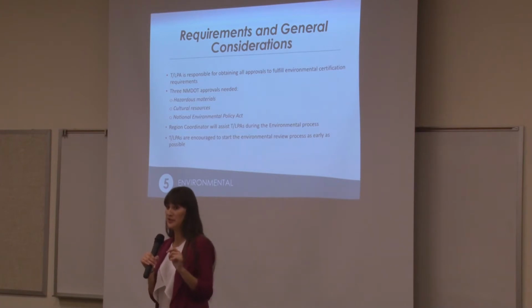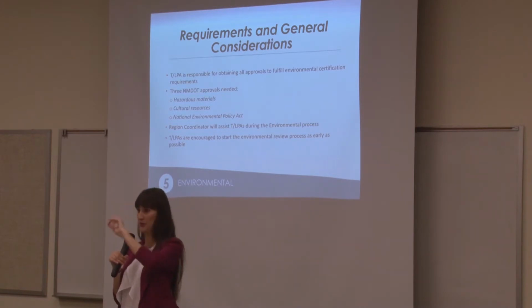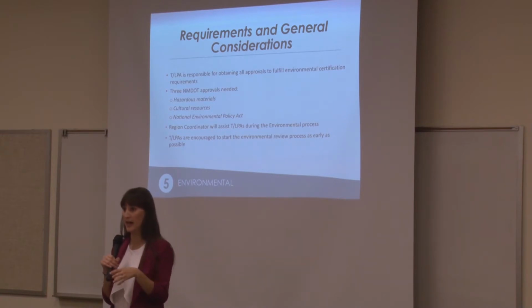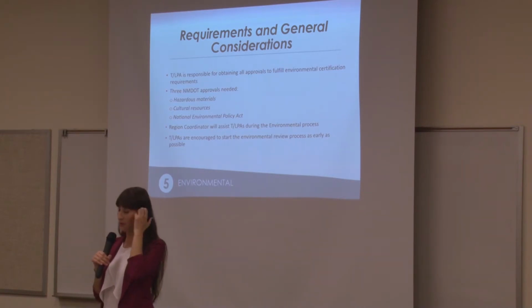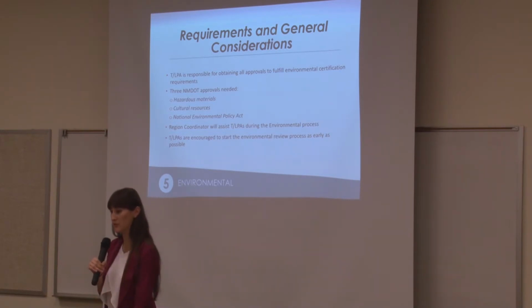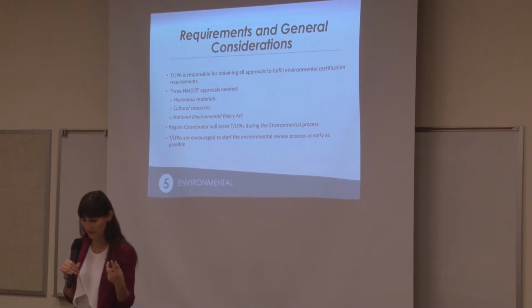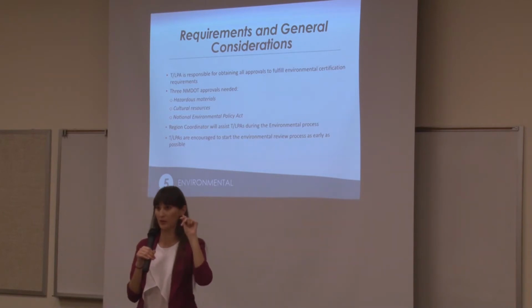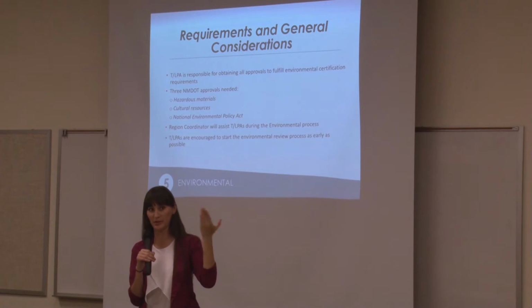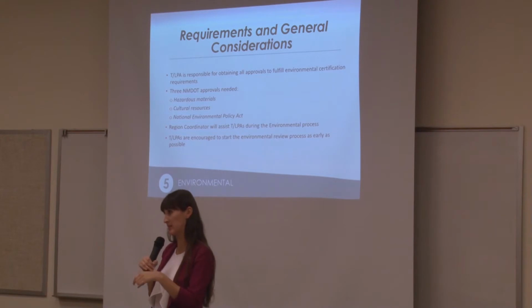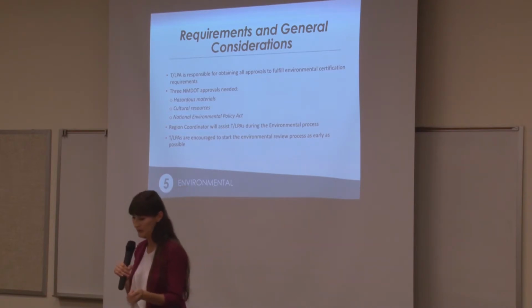Okay, so hazardous materials, there's basically 3 conditions that if your project does not have any of those 3, you can just do a simple ISA determination letter and submit that, and that takes care of hazardous materials. If you are going to be purchasing property, disturbing soil more than 2 feet, or impacting structures, those are the 3 triggers that would require higher levels of hazardous materials investigations. Okay, so all that information for hazardous materials specifically is on page 74 in your handbook.